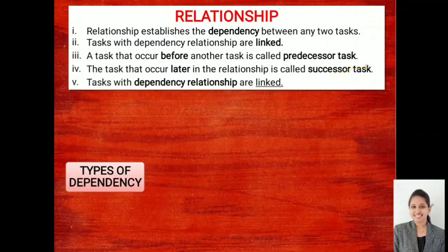That means only if my line out activity is completed, my marking is done, then only I can start with my excavation. So for excavation, line out will act as a predecessor. But what do you mean by successor? Only if I complete my excavation, then only I can start with my foundation activity. So for excavation, line out will be the predecessor and foundation concrete will be the successor.